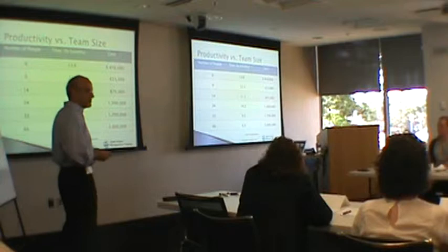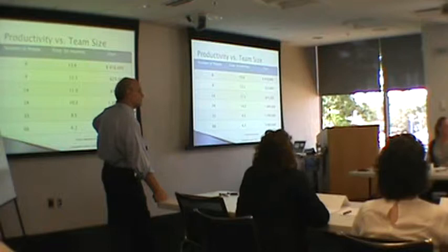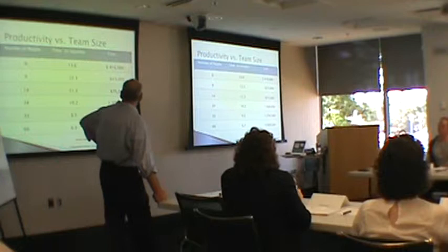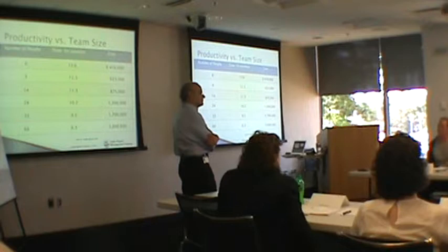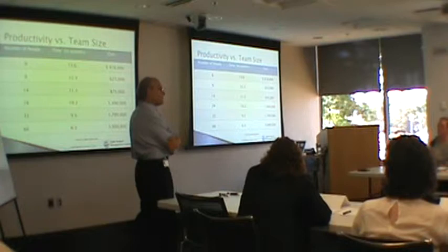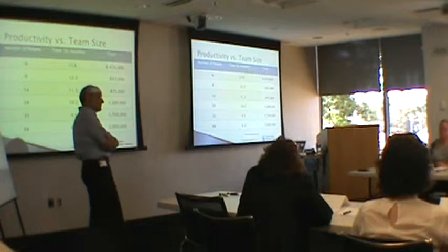So what's the right thing? You get into any project this size and immediately someone says we're going to do this faster, so they throw people at it rather than looking at metrics on the team and saying I'm at 50% capacity — help me get to 75% without adding any people. The right answer is to make more teams, not add more people. Seed and split. I know there are some agile teams right now that are 30 people — those should be three teams.